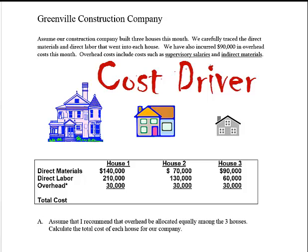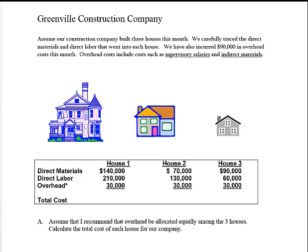What drives the cost of indirect materials? Well, maybe the more direct materials you use, also the more indirect materials you use. So the proposal is: add up the direct materials and direct labor for each house to get a total for all three houses, then look at what fraction of that total went into each house. Adding up direct materials and direct labor for all three houses together, you get $700,000.